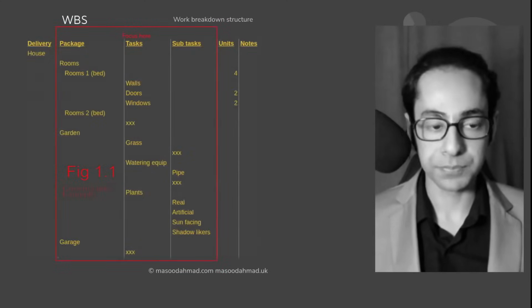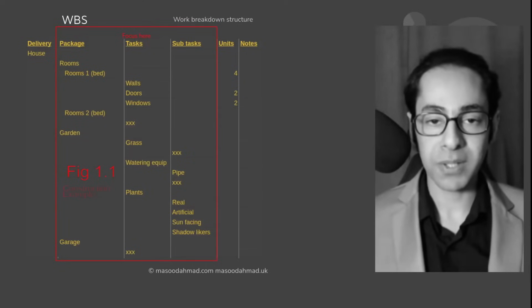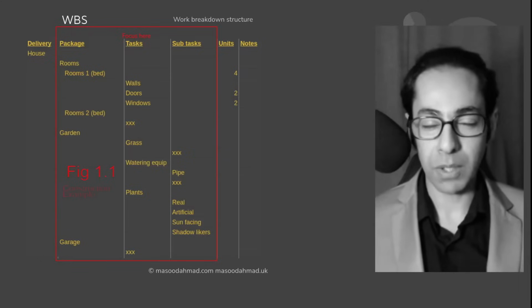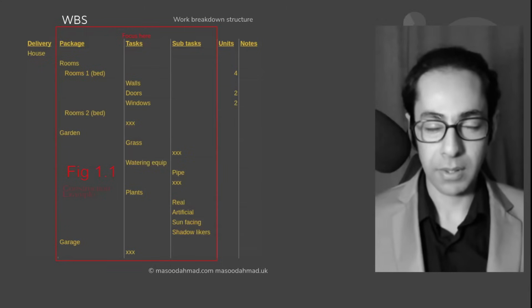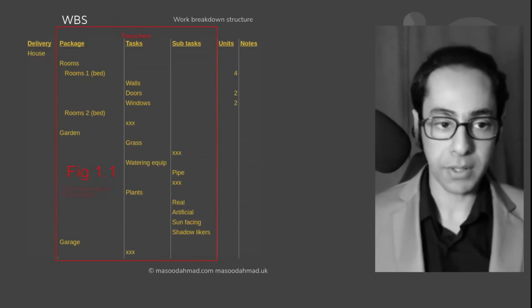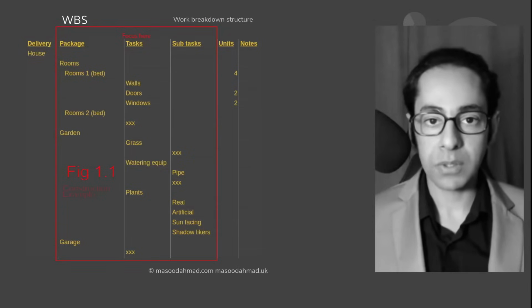For example, suppose you want to make a house. Close your eyes after opening a spreadsheet and imagine the house ready. You're entering the house, there's a gate. Note that down. There's a boundary, maybe a garden, inside or outside as per the requirements. There's grass, there are plants. In the front there's a garage. Keep noting all these things. Many things will come to your mind that were not even mentioned in the requirements. This will help you a lot.